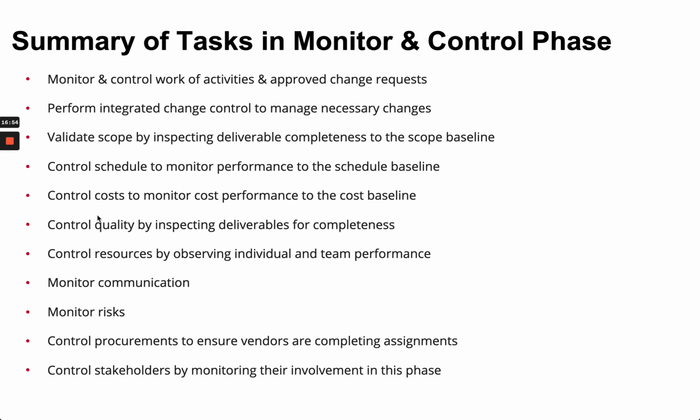You want to monitor communication, the risk. You want to make sure you understand. Can you avoid it? Do you accept it? Can you alter it? Or can you transfer it, say, to some other entity to enable you as the project manager to continue the project in that life cycle journey?